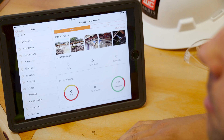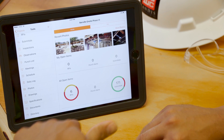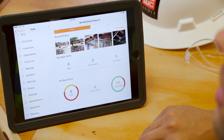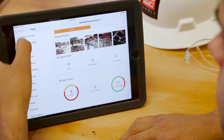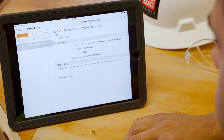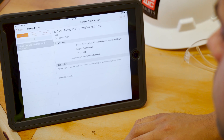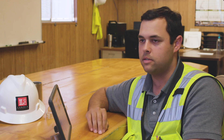I do a lot on my desktop as well, but it's all there. I can literally open up two or three tabs in my web browser and I'm looking at everything I need to know. I'm starting to do a couple change orders using Procore. If I get an RFI response back and I know there's going to be a change, Procore has the option to convert it to a change or note it as a change right then and there. I can go into my change events tab and start looking at them — adding a new furred-out wall and reversing door swings at some laundry room doors, and that was generated from an RFI. I've already got the background information, it's already linked — the meat and potatoes of the issue is there. Now I just have to go generate the cost.